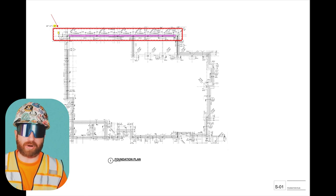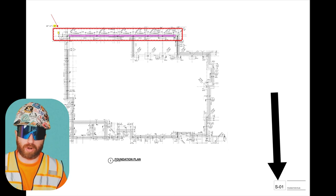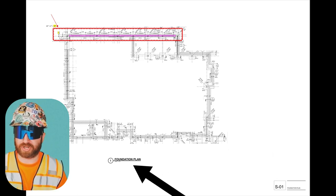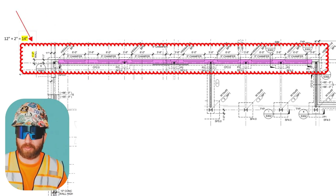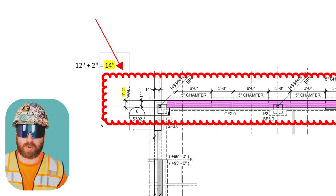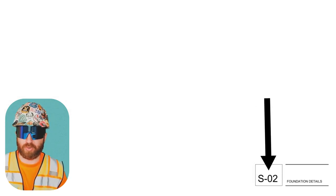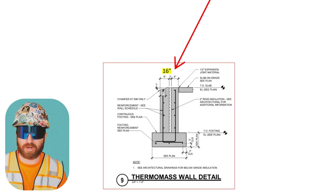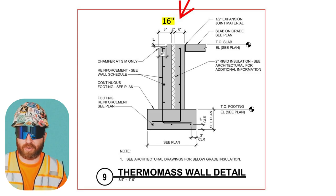Let's jump into a set of drawings. We're on sheet S-01, which is a foundation plan, and we're going to look at detail one — the overall foundation plan. I've already got the drawing marked up with bubbles, highlights, and an arrow pointing right to the area in question, which helps draw the design team's attention and expedite the answer. When we zoom in, you can see the foundation wall has a thickness of one foot two inches — that's 12 inches plus two inches, a total of 14 inches. Now on the next page, S-02, which is the foundation details page, we see a section cut of that same wall. Looking at detail nine and zooming in, the thickness shown is 16 inches — so there's a conflict between these two drawings.